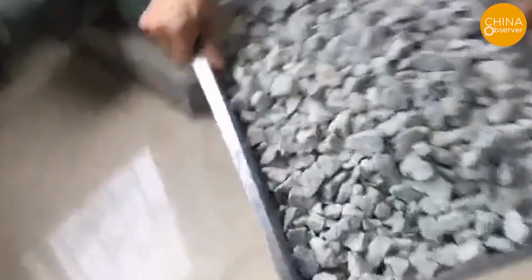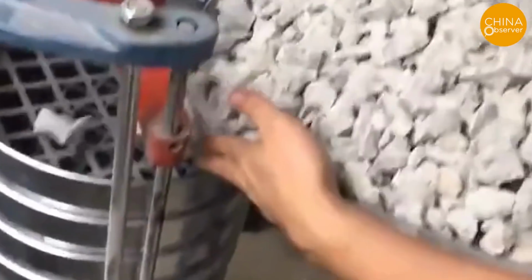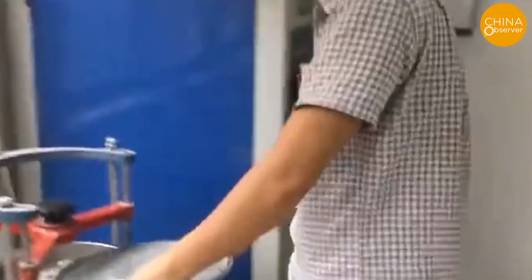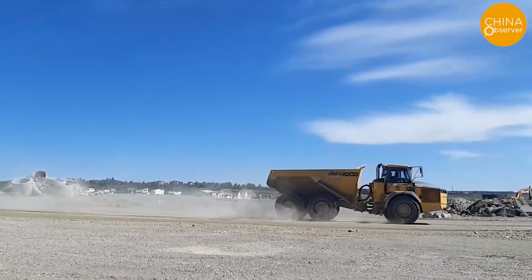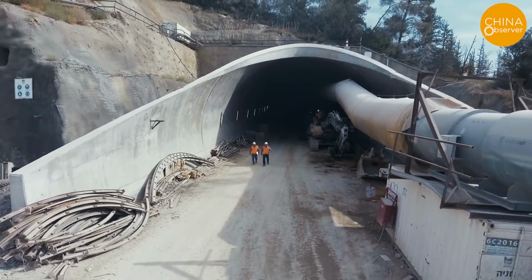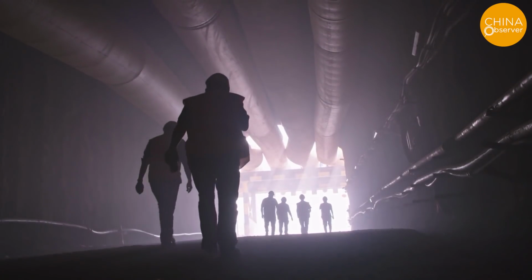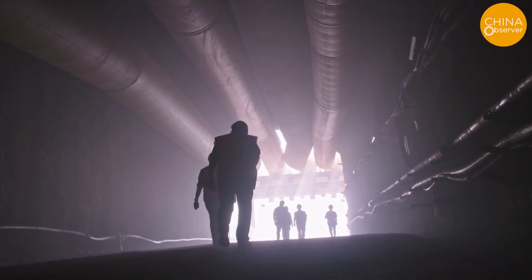During the early stages of construction, the laboratory sampling test results show that the slag of sand and gravel aggregate was not discarded as designed, which caused large-scale pollution and excessive mud content. After consultation with the owner, design, and supervision companies, the aggregate material source was relocated. During excavation, the inlet axis of the inflow tunnel deviated from the design axis, and this unstable rock body was not supported, causing collapse after entering the tunnel.